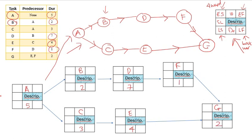So now it's time to calculate the forward pass. We're going to start with node A. The ES is always 0 since it's the starting of everything, so the early start is 0. So the EF is just simply 0 plus 5, which is the ES plus the duration. You will get 5.